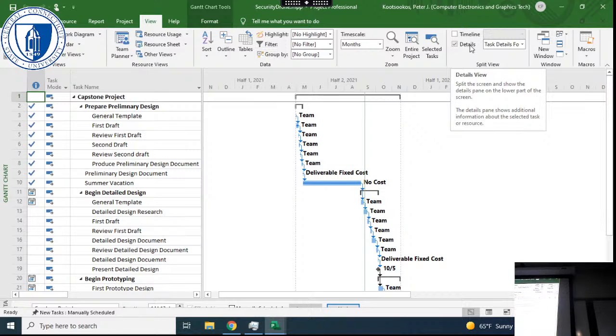Right, the team, I just put in one team resource. Normally what you would do is for every person on the team you would put in a separate line item. But I just put in a team resource. And then for every deliverable, the preliminary design document, normally that's a zero duration thing, but there's some value in having that document.